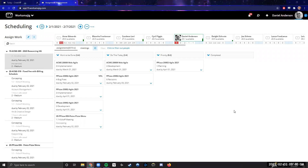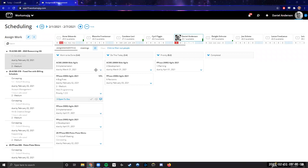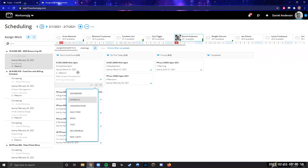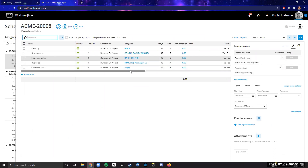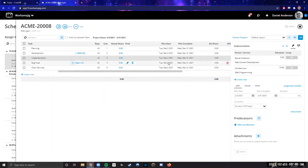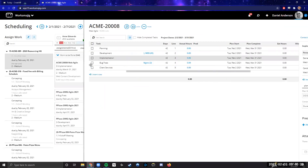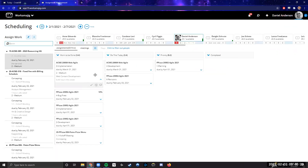A question about where the tasks assigned to a particular user come from: these come from the project schedules. The reason a task shows up is because on the project schedule, it says this person is assigned to, say, web content development for five hours over a certain time period. The system picks up that the task is active during that period and places it into the column.